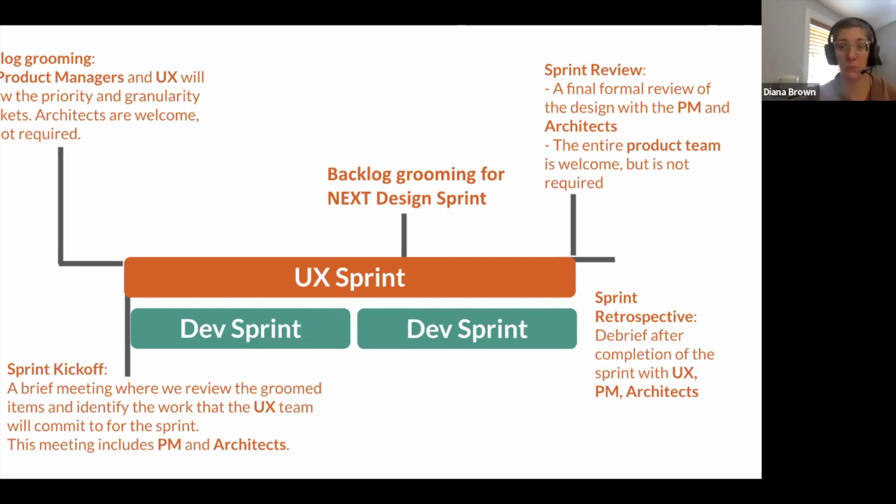So we decided that we would have a UX sprint that would be the equivalent of 2 development sprints, so 4-week-long sprints. It was not my ideal rhythm and cadence, but what I didn't want was a 2-week sprint for dev and a 3-week sprint for us, so that we were always off cycle. This way, just doubling what they were doing, we would start at the same time and end at the same time as the second one.